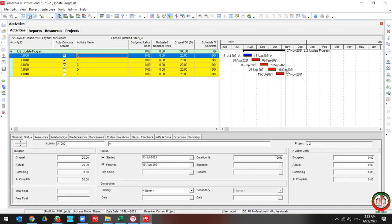But as you see, my data date moved, but my activities did not update by the software. However, only my selected activity has been updated.